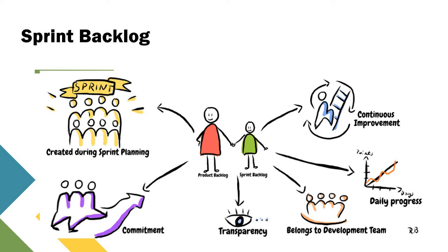The sprint backlog is a forecast by the team about what functionality will be made available in the next increment and the work needed to deliver that functionality as a working increment. The sprint backlog is a plan with enough detail that can be understood by the team to track in the daily scrum. The team decides together, modifies the sprint backlog throughout the sprint, and the sprint backlog emerges during the sprint.